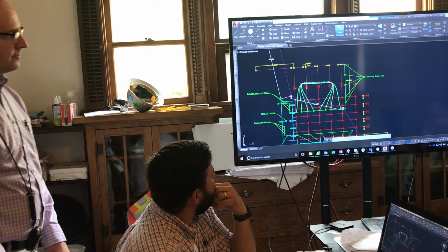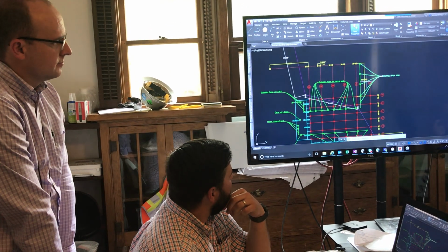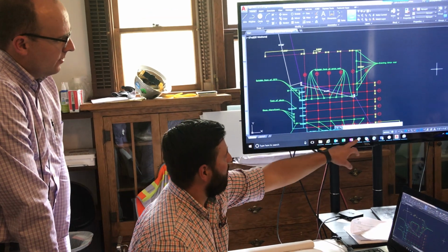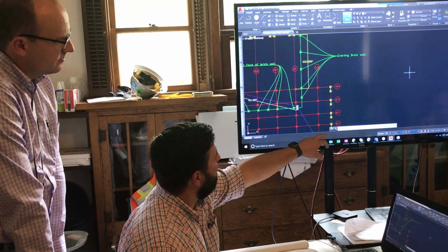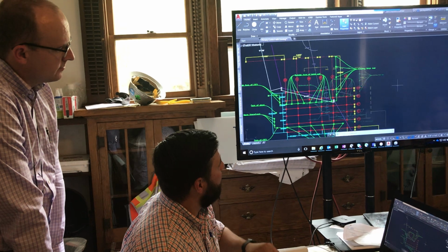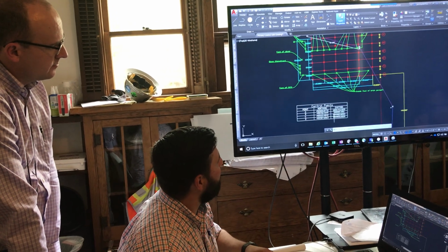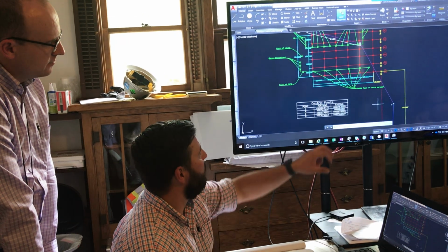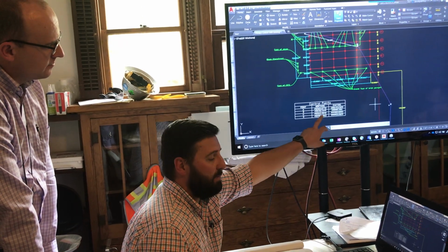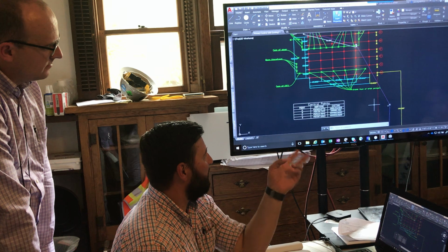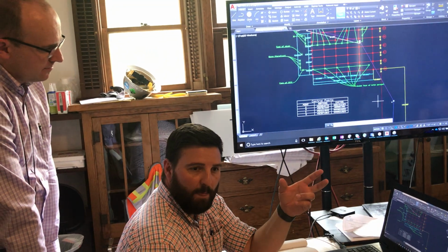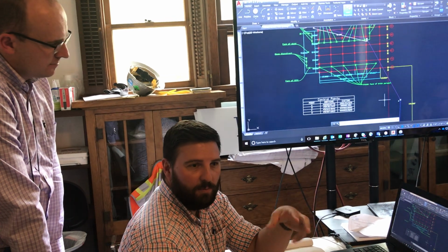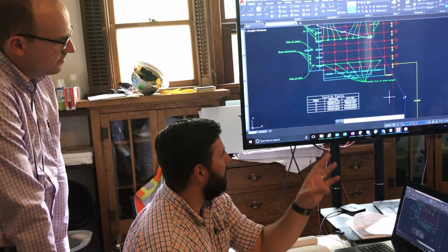Go ahead. So what we did is we laid that over top with the 4 points. So the 4 points that were given in the plans were the 4 corners of that grid line. We were able to take these points in there, put them in, and see how close we were getting to from our surveyed control points. These were essentially the typical points that were in here. We found that there was a little bit of error involved in that, and that they didn't take it out to enough decimal points, so it didn't allow us to close everything correctly.